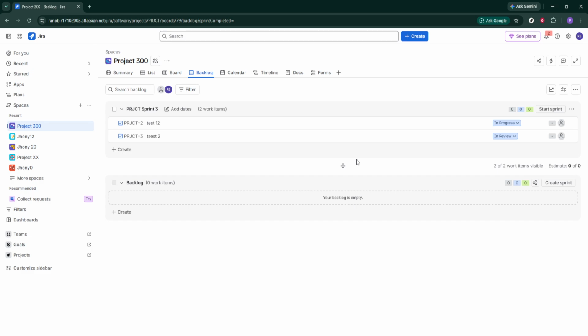Finally, once you've completed the sprint, it's a good practice to gather your team for a retrospective meeting. Assess what was accomplished and where improvements can be made moving forward. This practice will strengthen your Agile workflow and keep your project moving smoothly.